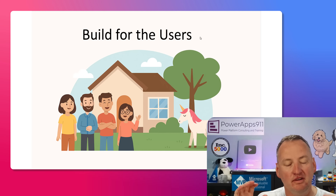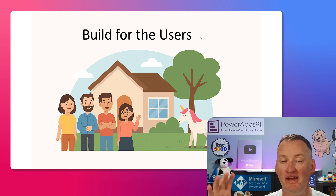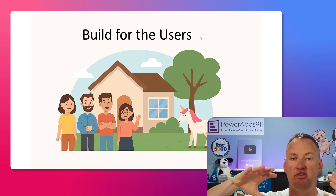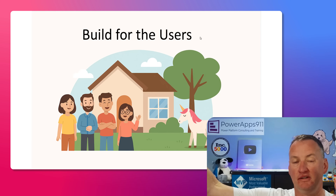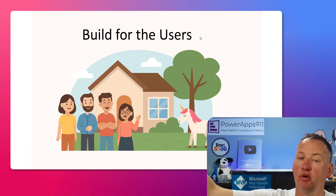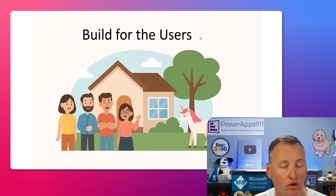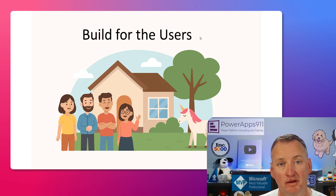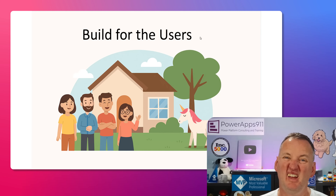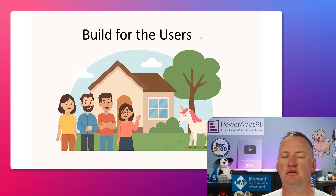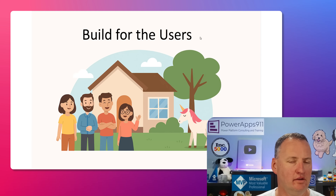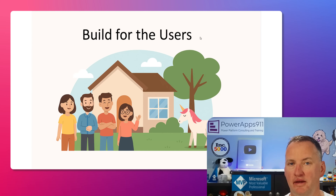Just because you can make an app responsive doesn't mean you should. Just because you can make an app work offline doesn't mean you should. You've got to really think about it and ask: is the juice worth the squeeze? Does it make sense for what we really want to accomplish? Because by adding those things, you're extending your timelines, extending your requirements, making the project take longer and cost more money. You can often serve 99% of requests with one app — start there and see if you really get demand for the others.